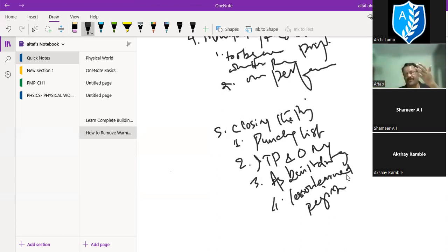Now how did it get solved? We brought in a consultant or we did it on our own, or whatever the procedure was. So what are the problems involved in the project and what were the procedures to resolve them? All these items are written in a log register, which is called the lesson learned register. This is a very important register which you have to submit to your client and to your head office also. Why? Because next time, if a project of the same nature is executed, this trouble will